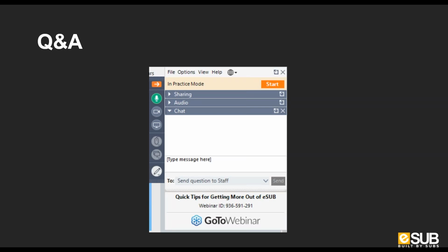An easy way is that the foreman has to start their day with a field note or a picture of the job site, and they have to end their day with a picture. We call this eSUBing the job. Even if they're not doing their field notes every single day, if you force them to get in there and at least start with taking pictures and documenting what's going on out there, then it'll be a huge start in getting them to take it to the next step.